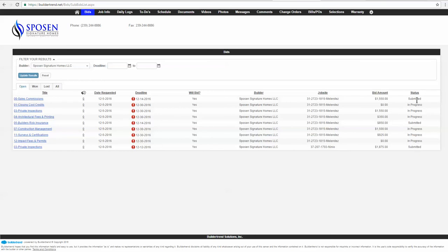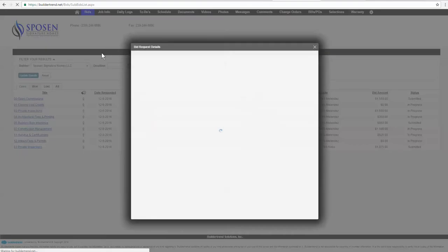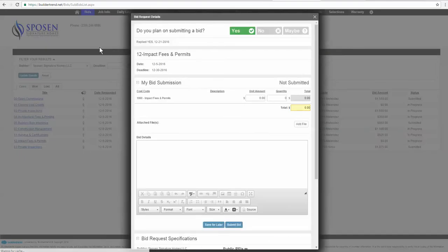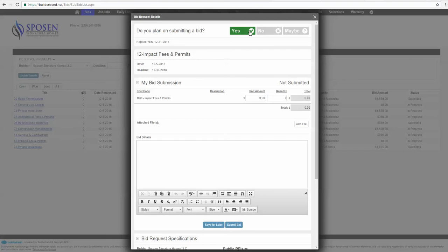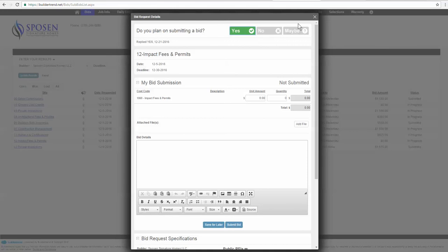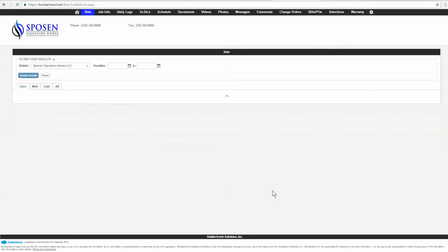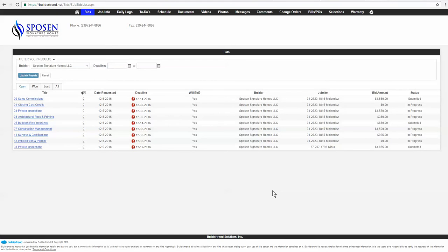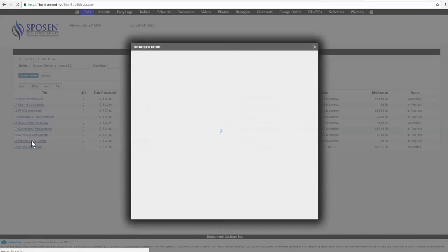To submit a bid, let's just select one here. I'm going to select this one for impact fees and permits. One of the first things, if you don't have time to bid, just go ahead and let us know. I'm going to bid it, just hit yes, but I just don't have time right now. You can just save it for later. So click yes and then save for later. That lets us know on our end that you do intend to bid, but you don't have time to do it today. But make sure that you do it before the expiration of the bidding request. So let's go back in here again.